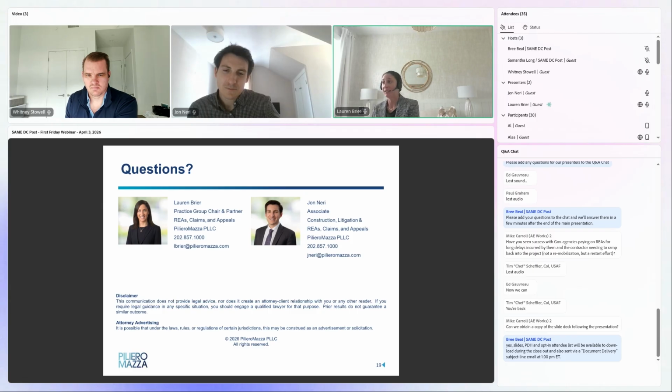So you're actually right in litigation once that notice of default hits you. It will likely go into your CPARs. It will also likely go into your SAM. And the problem with that is that you're really not afforded due process, at least from my perspective, because all this gets uploaded into the system and then you're starting to lose contracts while that default is on your record and while you're appealing and challenging it. So as soon as a client reaches out to us, hey, we got a default, we are moving on that lightning fast because of the implications it can have on future bidding.